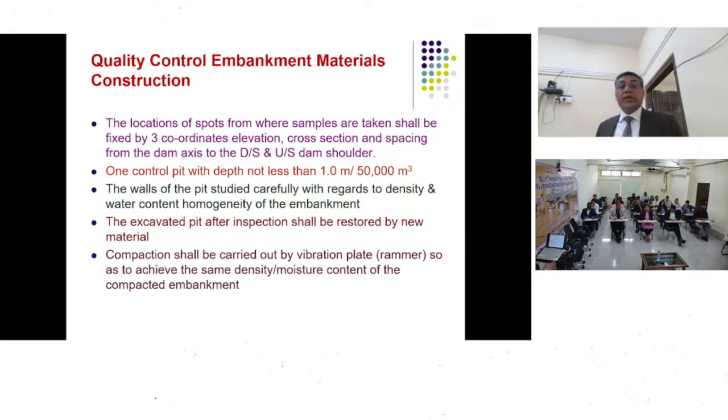The locations or spots from where samples are taken are to be fixed by three coordinates and elevation. Why three coordinates and elevation? Because that is the way you will be able to understand where you have taken the sample from.